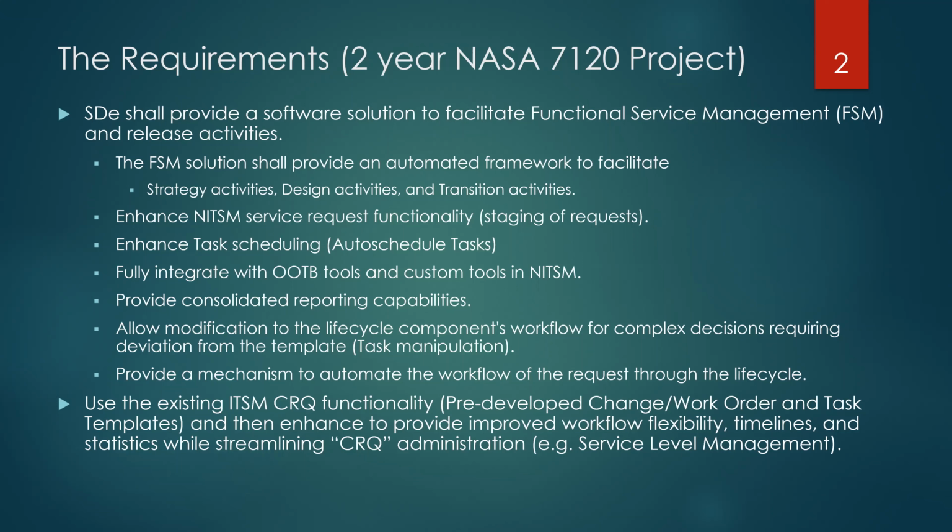So if I have a request to redo the way we do land networks at every center at NASA, you don't do that under one change request. You've got 15 centers and facilities. You want 15 change requests. Well, the nice thing about this is it becomes that wrapper to put all 15 together. So you build the one main change request, and then you do add-on change requests. And I'll get to some of that in a minute.